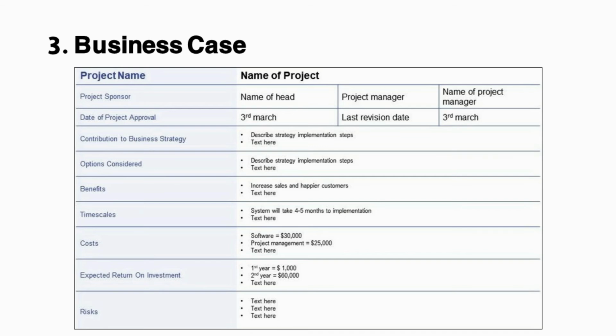The approved business case provides a record of the decisions made by governance about how to achieve the required return on investment from the work. It documents the options considered, and it is normal practice to include the do-nothing option as a reference. Through this approach, the business case becomes a record of the recommended option with rationale and evidence to support the decision.